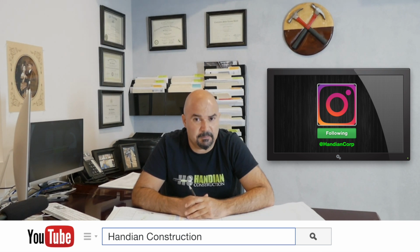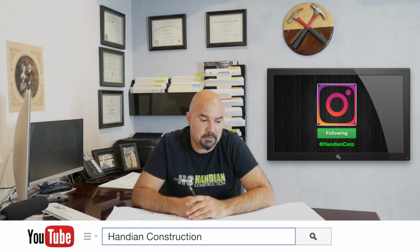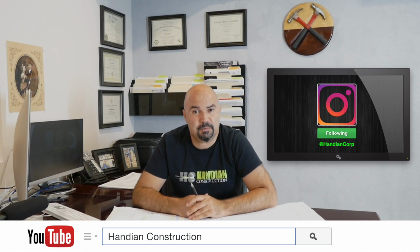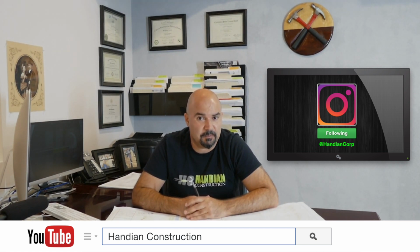There's no waiting game. The reason for getting to know the contract ahead of time is that I already pretty much know which subs to use on that project. So I would give them a heads up, get them ready, and I know which ones have to be on the site right away. And that's how we set it up.